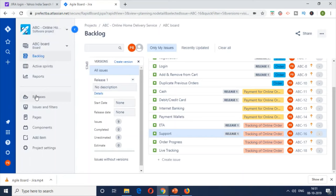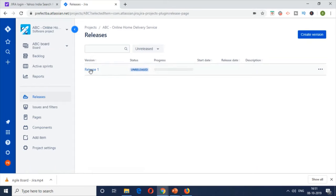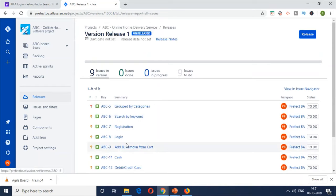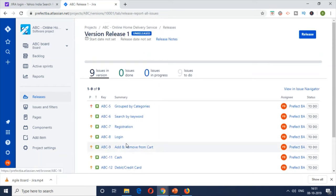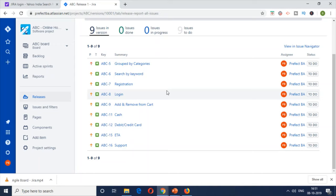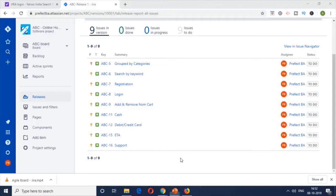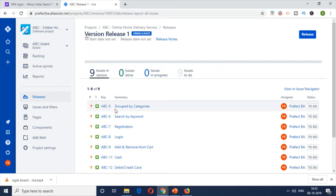That's how you do release planning. For this particular product version to be released to the public, all nine Release 1 items need to be delivered. Similarly, the remaining five items can be tagged to Release 2 and Release 3 and tracked to closure. But we won't be able to complete all of these in a single sprint — multiple sprints will be required. So the second part of this video is sprint planning.